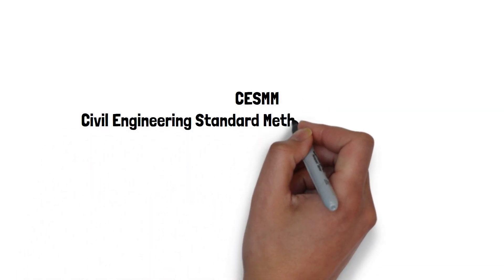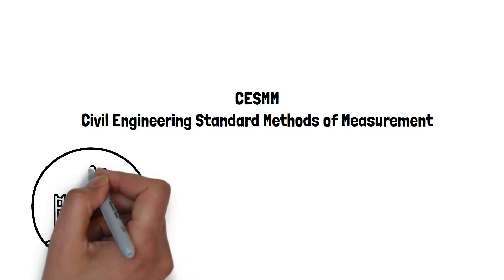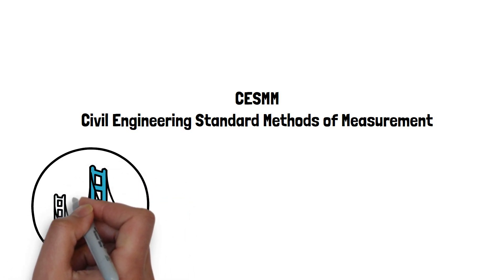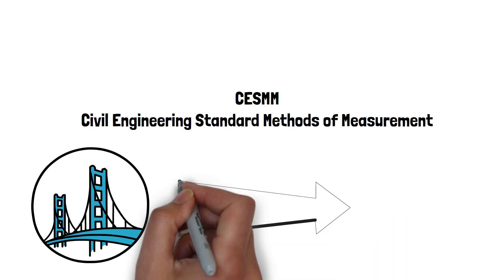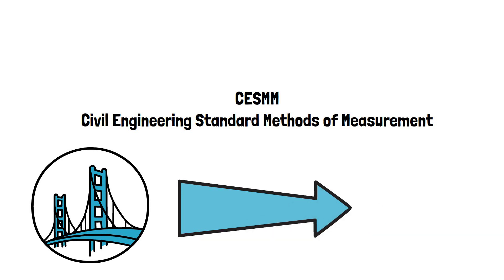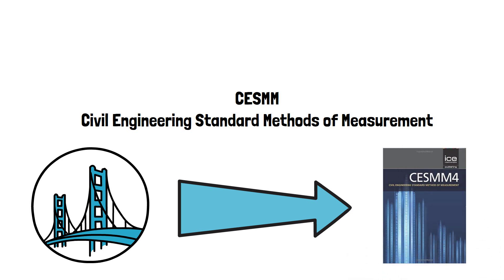CESMM stands for Civil Engineering Standard Methods of Measurement, and it is a standard which incorporates rules and regulations for measuring elements of major civil engineering projects. The first edition was published in 1976, but there have been numerous versions and updates throughout the years to ensure the information is still relevant to the present day and to ensure the standards do not get left behind current building methods and innovations. The most recent and up-to-date version is CESMM 4, which was published in April 2012.